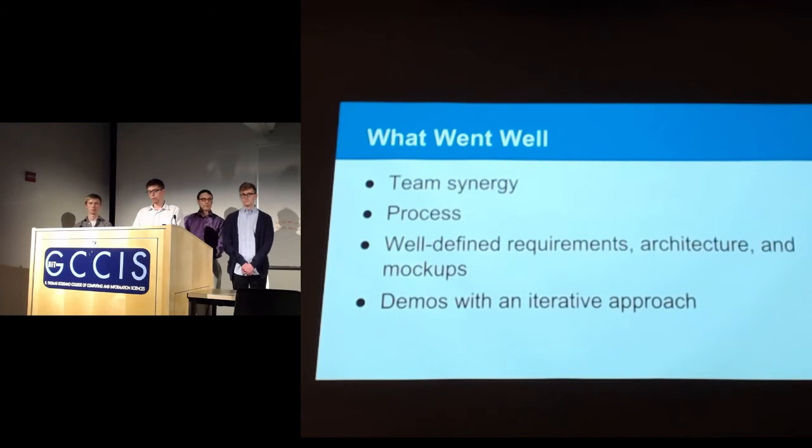Our process of evolutionary delivery proved very successful because every 2 or 3 weeks we'd have a meeting with our sponsor and our client in which we'd get excellent feedback. We started out first with the development of a static survey to get the look and feel, and once they approved that, we went on to the editable survey portion, and finally we added in themes and reports.